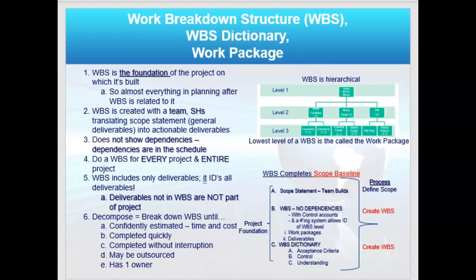Now, if it's not in the work breakdown structure, we say it is not in your project. That helps stop scope creep. If it's not in my work breakdown structure, meaning it doesn't tie up to delivering the scope statement, which are my objectives, then it is not in the project, right?